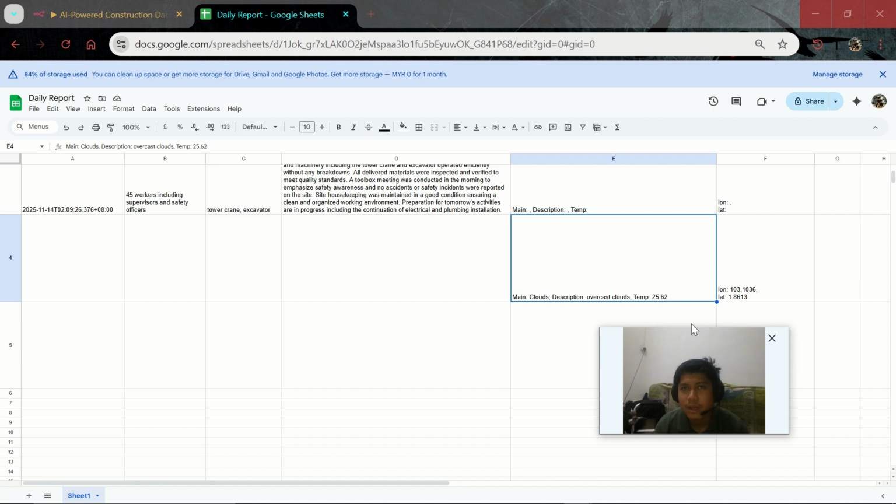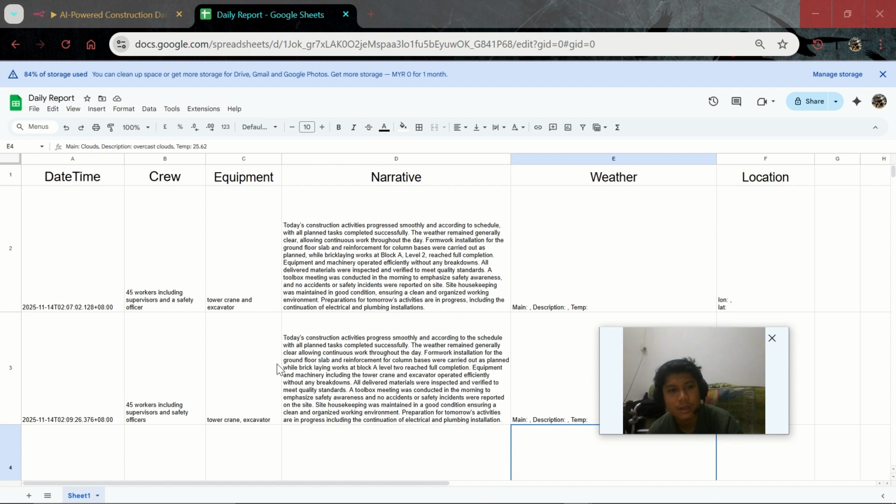By using this AI-powered workflow, the crew or employees can just send the progress report daily into this Telegram bot, and N8N will update the data it gets from the progress text and show it here in the Google Sheets.